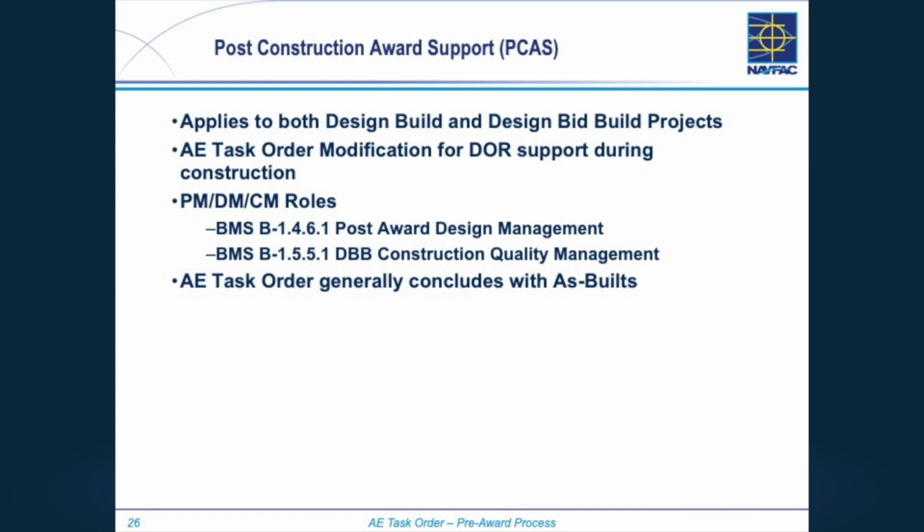Now you've awarded just a pure construction support mod to your AE task order, because you're going to want that designer to be the one reviewing shop drawings and submittals and making sure that everything's in accordance. I gave you the BMS. This one's really more talking about the role of the CM, the one on 1.5.5.1. And generally, your AE task order is going to conclude with them giving you the as-built.